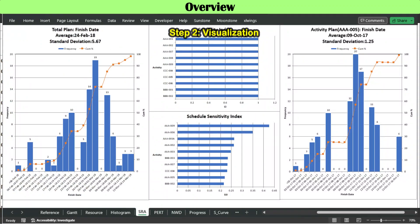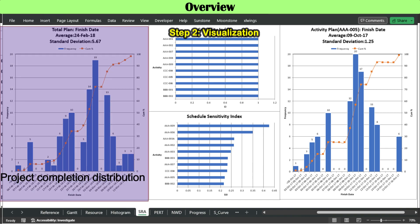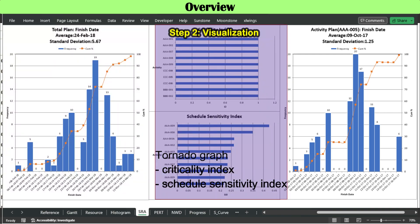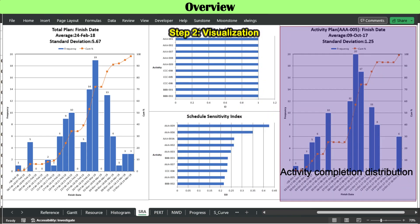Step 2 is to visualize the results of the Monte Carlo simulation by creating Excel charts: a distribution graph of the overall project completion schedule, tornado graphs — one for criticality index and another for schedule sensitivity index — and a distribution graph of a specific activity of interest.